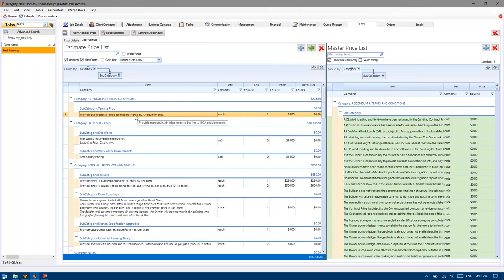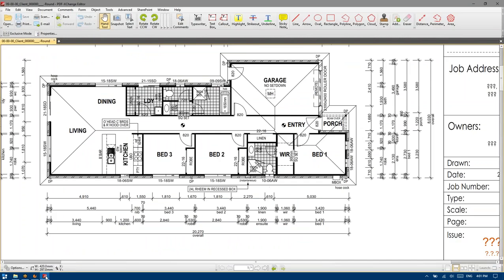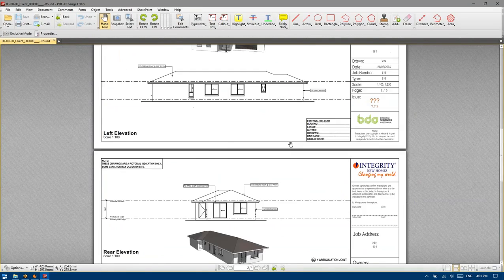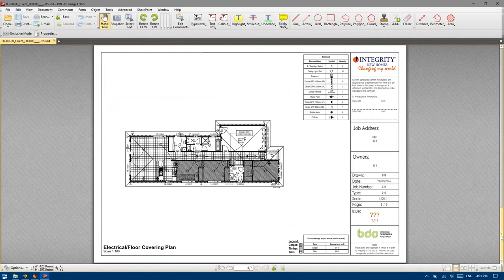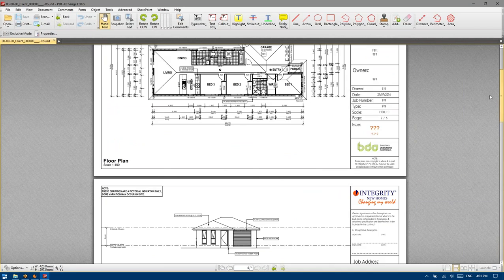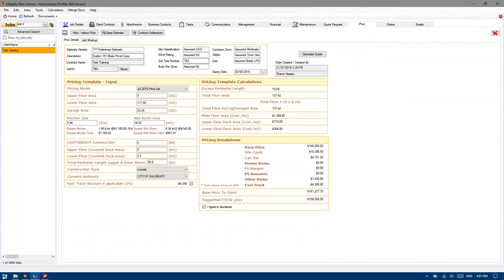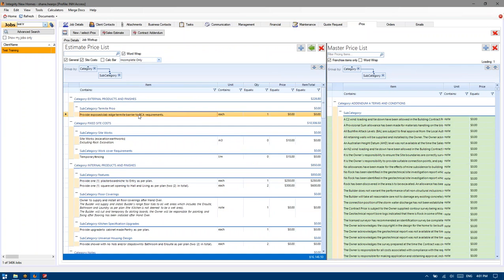Same applies to the slab edge termite barrier. No one's communicated to me regarding this job specifically that they wish to use a Trithor or Termguard or equivalent physical termite barrier system or a reticulated one. So my assumption is it will be relying on an exposed slab edge, which isn't too difficult with a H2 class slab, because they're like 400mm thick anyway. Right-click, mark complete.